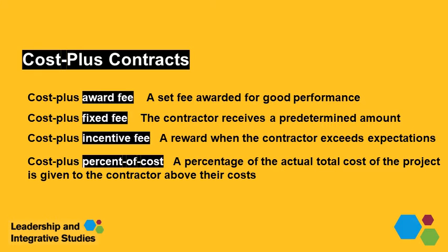In cost plus contracts, the purchaser agrees to pay the actual cost of the labor, materials, and any unexpected expenses. Then the plus is the fee that can be awarded. There are several subtypes here that provide different ways for the incentives to be arranged. Each of these contracts includes the details that explain the conditions for the fees to be awarded.